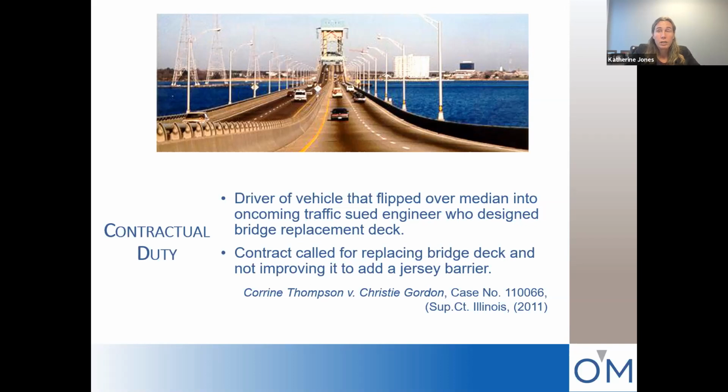And the state Supreme Court said, look, you contracted to replace the bridge deck, and replacing the bridge deck did not include improving the bridge deck or adding a jersey barrier. And so on those facts, the court said that the engineer's duties were confined to those duties and agreements that were specifically set forth in the relevant contract. And so this case is a good example of a contract that ends up helping the engineer by limiting the scope of its services to what it actually originally contracted for.